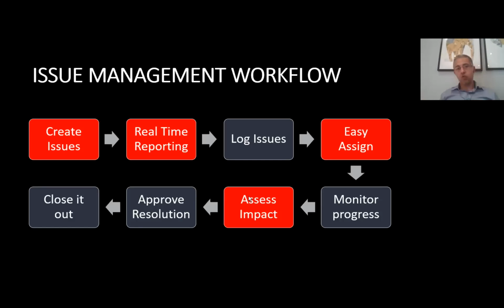If you look generally at the issue management workflow, there are some steps, and one is you have to create an issue. Somebody who sees the problem has to create an issue. Then it should trigger real-time reporting, and logging the issue is important because afterwards you want to check the issue. Then you have to assign this issue to a responsible person. I think it's one of the most important things, because each issue needs a responsible person. It should be transparent, and you have to assign issues easily. I think that is an important thing.